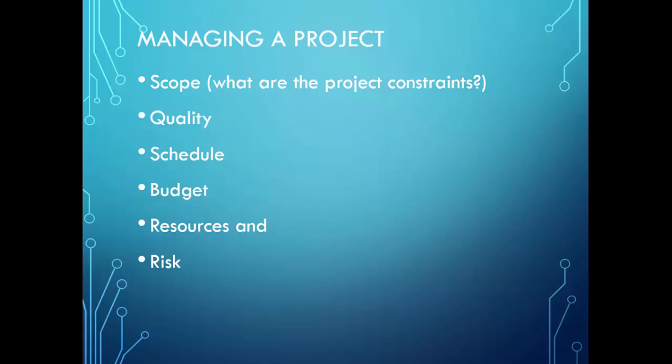When you go deeper in the project, it will be more expensive to make any changes, because you have already done lots of execution. So you need to know that time is very important, budget is very important, and you need to finish within time and within budget.